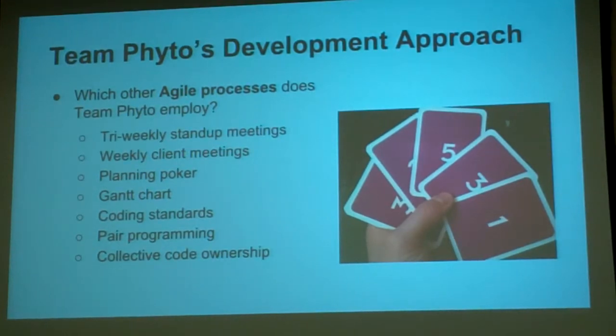We also used the planning poker thing that we learned in CS 480. So we had all of our requirements, we listed those out, and we assigned them amounts of time, so we kind of had an idea of how long everything was going to take. We also created a Gantt chart, and it basically scheduled all our work so we could see what we were supposed to be doing, and we'll have to make a greater effort to stick to that the next time around.